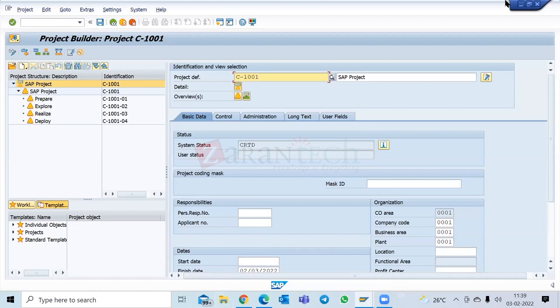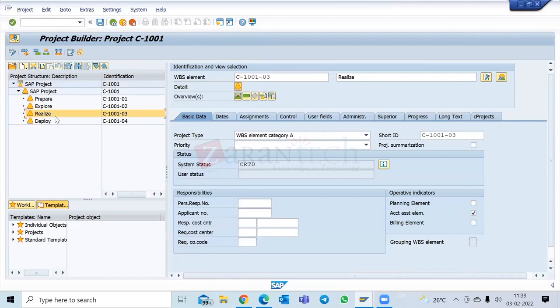Let's say this is some project based on some deliverables. Some deliverable is happening in the USA. One project, I want to manage it as one project. This is happening in the USA, not by geography, but by company code. Geography is immaterial here. In a USA company code. Another deliverable is happening in the UK company code. And there's the offshore delivery component, which is happening in the India company code. In that case, you may have this type of structure with multiple company codes.